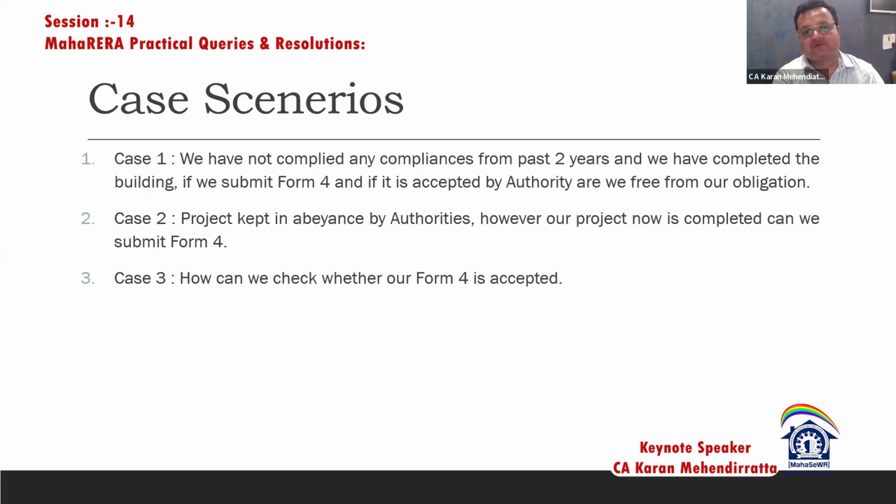In case 2, if the project is kept in abeyance by the authorities, however our project is now completed, can we submit form 4? This is also one of the major issues which we get in our practice. Once the project is in abeyance, you cannot submit any form 4 because the quarterly compliances or the documents upload section is blocked by the department.